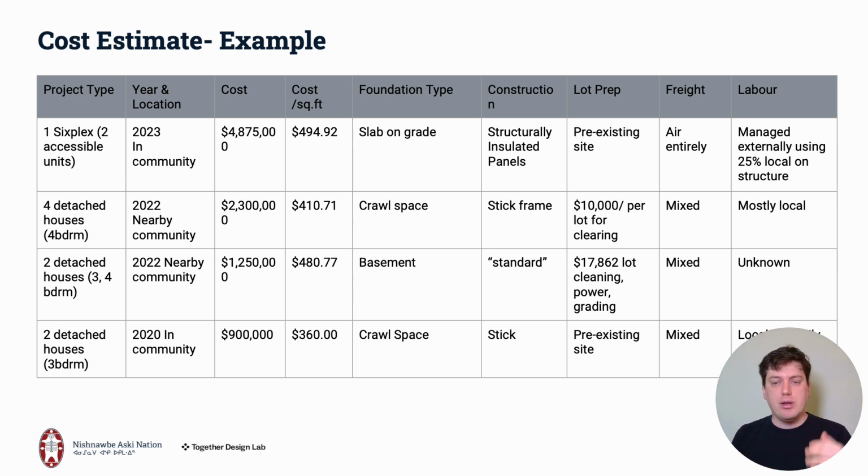Or, for example, to reference one of the lines we see on screen here, maybe you're building multi-unit this year, whereas in the past you have usually built detached units, and you want to understand what that cost savings might be. It might be relevant, again, to reference the per square foot costs that other communities were seeing in comparison to the per square foot costs that you were seeing.